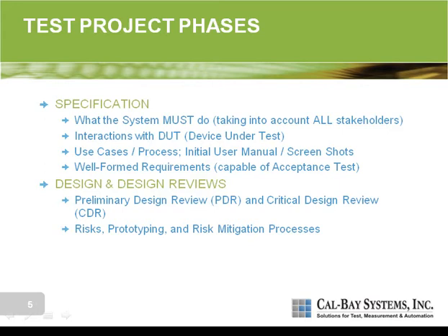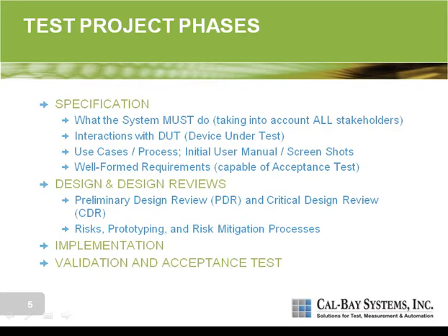And we go off for some period of time, maybe a week, maybe 4 weeks, and we come back to a critical design review. The idea with the critical design review is that at this point all of the requirements are frozen. We are showing what the system is going to look like and everybody is agreeing on the path forward. After the critical design review, it's time to do implementation. And now we have a very clear plan of what everybody needs to do, how long it's going to take, and how much it's going to cost.